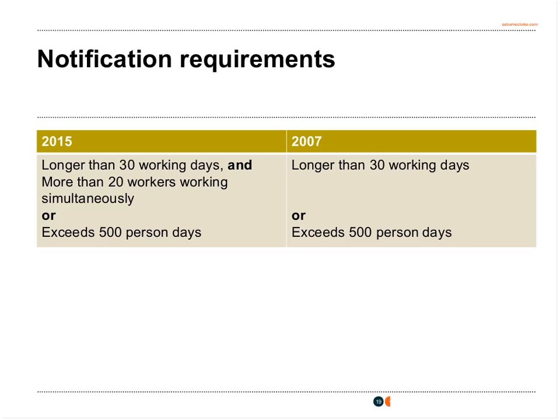Importantly now, it is the client's responsibility. As I said, it is still carried out on a similar form to previously, but one of the things that has changed is the threshold for notifying. The threshold's actually increased, so now fewer projects should need to be notified to the Health and Safety Executive.